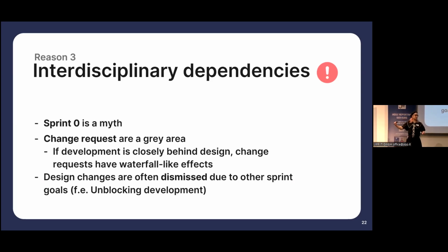But what you have to tell your PO in that moment is, if we do this later, we need to update not only 5 designs, we need to update 50. Because in all of those designs, we're using this element or this pattern. And it leads to way, way more work down the line, in the worst case even with stuff that is already developed. So change requests are really a tough nut. Let's just say it's a tough nut to deal with.